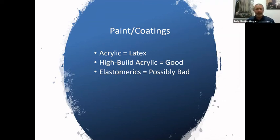A painting company like myself, I'm just an applicator. So I'll lean on Sherwin-Williams to write the specification. Sherwin-Williams, in the projects that we do, comes out at every phase. They come out when we're doing the pressure clean, when we're doing the priming, when we're doing the painting. They'll have mil gauges. They'll inspect to make sure that the millage is correct.